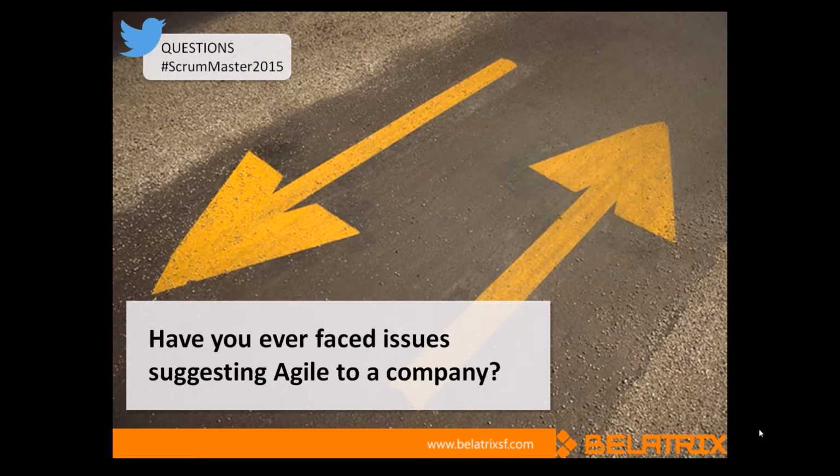However, we were facing some issues like lack of user stories information. We could not track the work in progress properly as we didn't have defined sprints. So we slightly suggested they use Scrum by providing them concise and important information regarding that framework. We started by defining sprints of one week, and after some months we could finally introduce the retrospective meetings and also other ceremonies and processes that Scrum suggests.